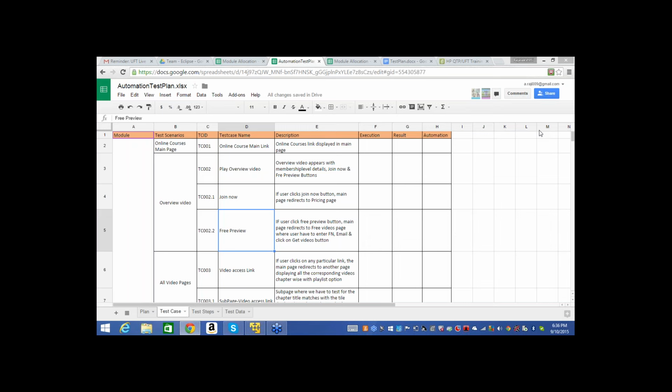So, this is Shankar. If you hear it correctly, Karthik has already answered this question in terms of saying you start allocating the tasks in a day or two. We would come to know. The rest of the folks would be joining, hopefully. If not, we look at diverting it to the other resources. But you should not stop things just because they have not come. Go and allocate your tasks, module allocation and everything, but do it in such a way that you don't have immediate dependency on the folks that have not joined. Probably the independent tasks, what they can handle, you can give to them.